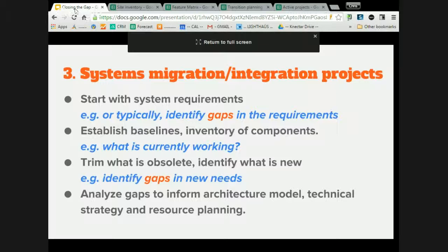So the next question is, it may or may not be needed, and it may or may not be mapping to a requirement. Hopefully everyone agrees on the requirement. And then the second question is, where will it live after the transition? Is it going to stay in Drupal in its clean, stable, non-buggy form, or is it going to get moved over there? And now we have a lot of information from which we can do our simple filtering.